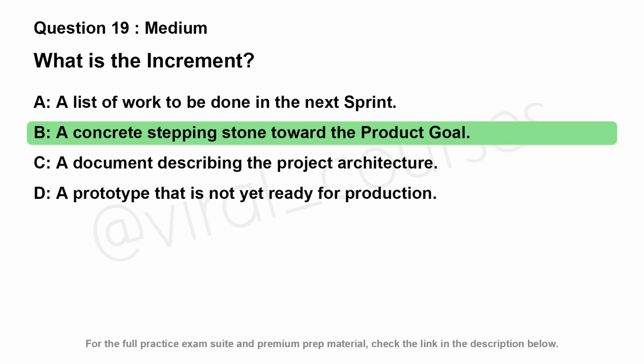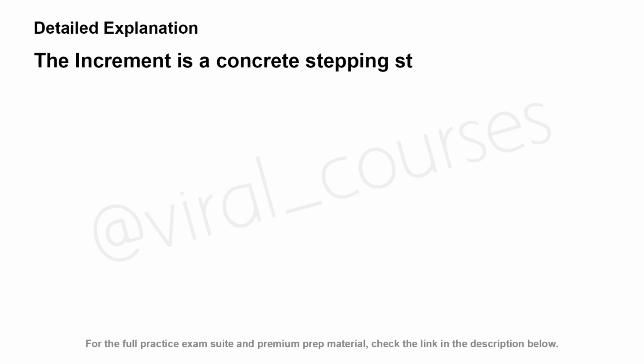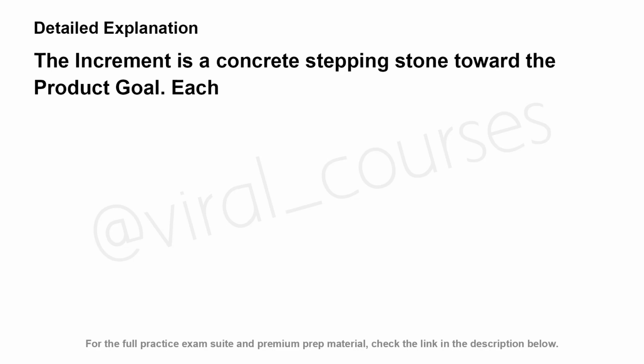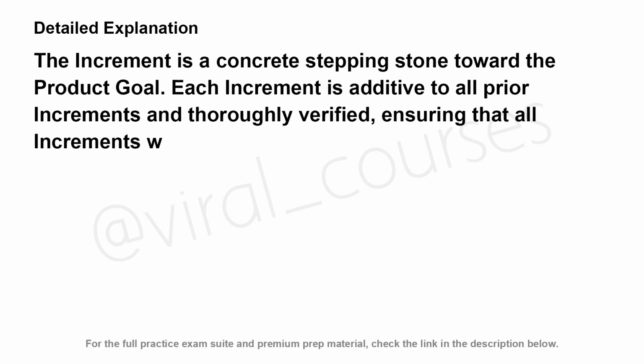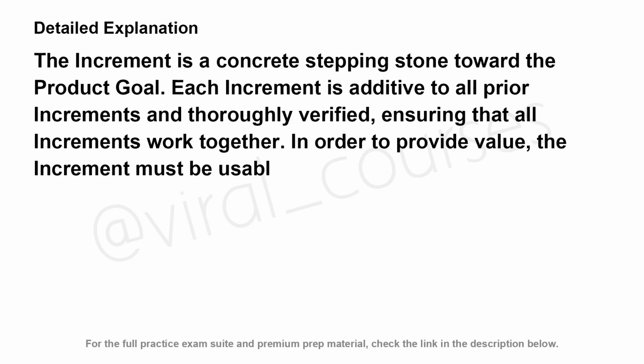The correct answer is B. The increment is a concrete stepping stone toward the product goal. Each increment is additive to all prior increments and thoroughly verified, ensuring that all increments work together. In order to provide value, the increment must be usable.